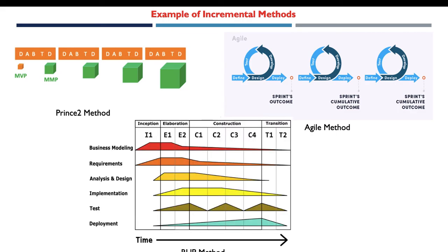Another example of incremental methods is the Rational Unified Process (RUP). This method is both incremental and iterative. It has four phases: inception, elaboration, construction, and transition. The iteration goes through many activities — from business modeling until deployment — and at the end of each iteration we have a release representing a subset of the final release. Each phase of the process may include one, two, or more iterations.